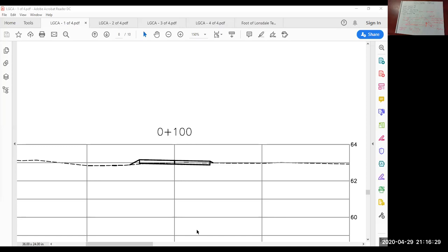We'll add the bigger 3.9 and the tiny 0.1 and divide it by 2. So it's 2.0. These will be blank, yes. Okay, so that is the first question. It seems like a long drawn out process, but once you get the hang of it, it goes pretty quick.